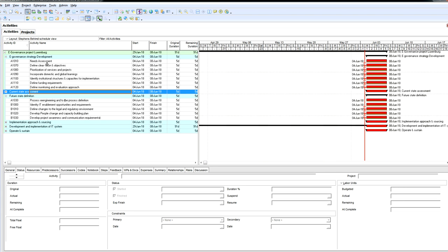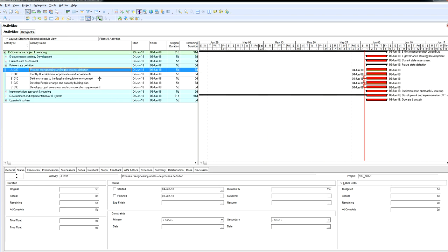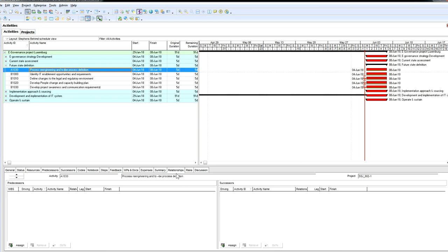What we're going to do now is sequence all of the activities in terms of the relationships. So we're going to add predecessors and successors to all the relationships. What you can see here is, for all of these work streams, you've got all of these activities already sequenced, but I've added in 1 or 2. If I wanted to see whether an activity had predecessors and successors, all I'd do is scroll down to the area that has the layout for all of the attributes that can be defined for the activity. I'll click on relationships, and usually this is what I like to use, because I can see the predecessors and successors for the selected or highlighted activities.